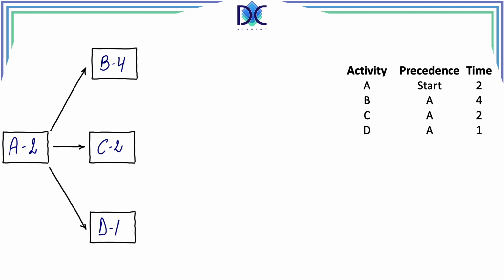So now we have the 4 first activities, and we see that we have the nodes for A, B, C, and D with the relevant information, and the arrows indicate the relationship between A and B. So it means that A first starts and B can begin only when A is finished. The same for C and the same for D.